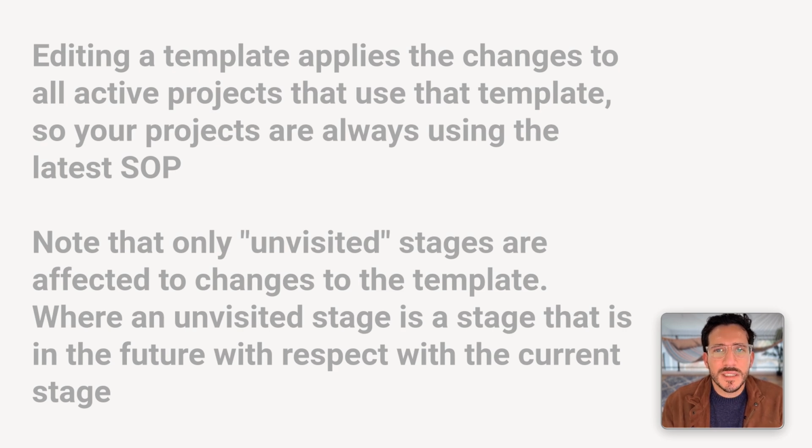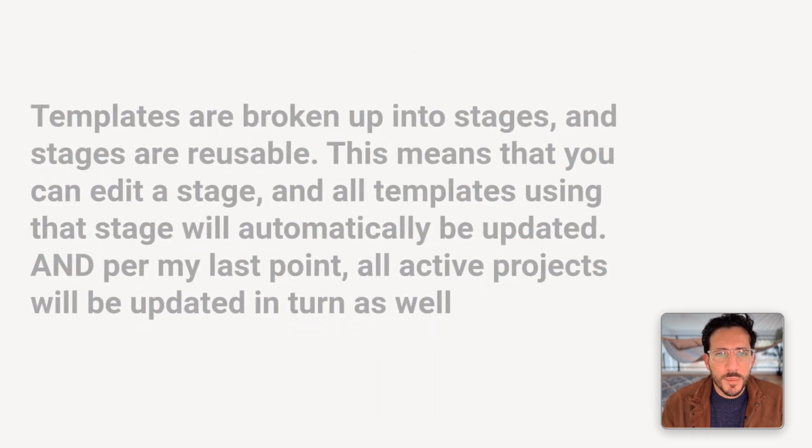Note that only unvisited stages are affected by changes in the template, where an unvisited stage is a stage that's in the future with respect to the current stage of the project. Second, templates are broken up into stages and stages are reusable. This means that you can edit a stage and all templates using that stage will automatically be updated. And all active projects will be updated in turn as well.